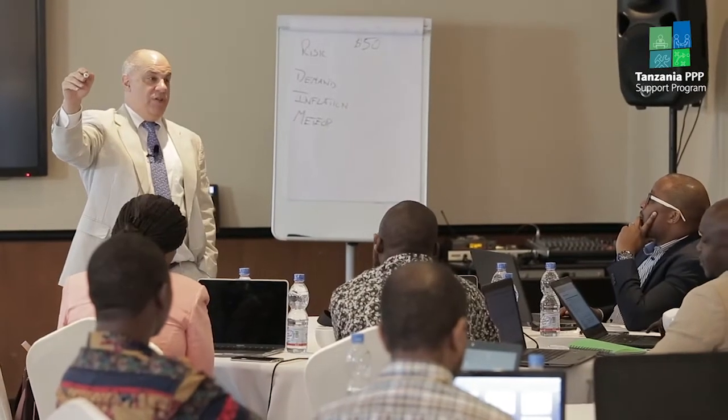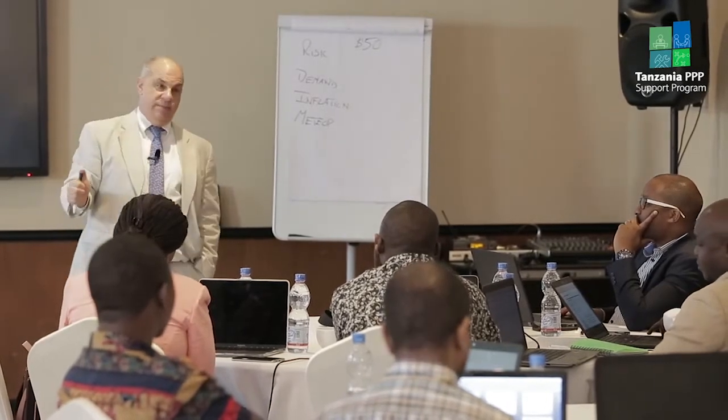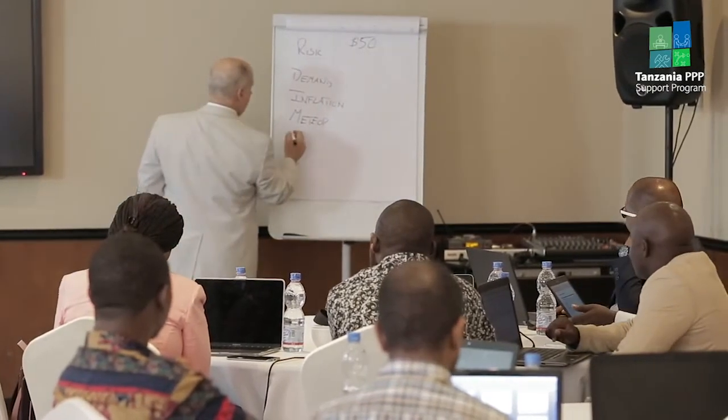Let's say the bridge is going to be going over a river. Okay? What's another risk that you can think might happen to the bridge? And it could happen 30 years from now. Political leaders may decide to build another alternative. Okay. So what if politically, let's say 10 years from now, the political leaders 10 kilometers downriver decide to build another bridge, but it's going to be free? Okay? So I'm going to call that a competing bridge.